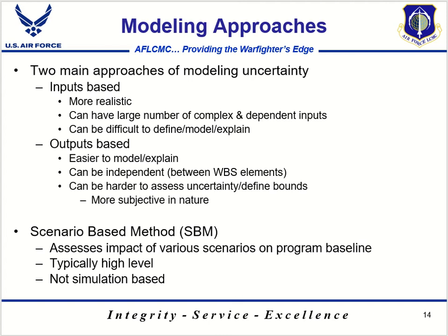I've included the scenario-based method here at the bottom of this slide. This isn't simulation-based. What you're doing here is creating realistic possible scenarios for your program and assessing the impact that they might have on the program and then trying to quantify that impact.